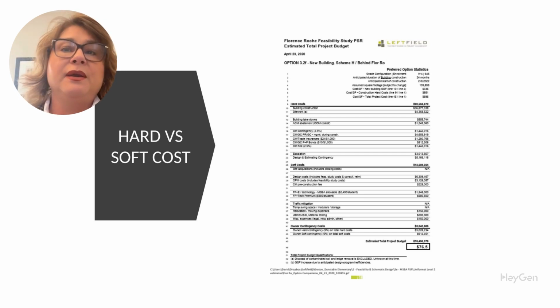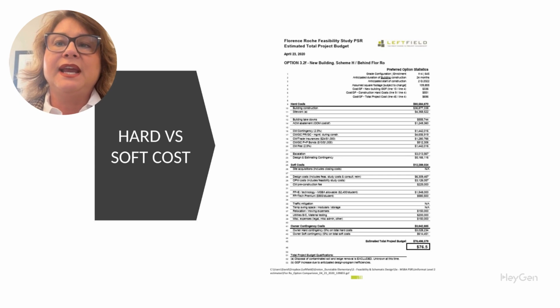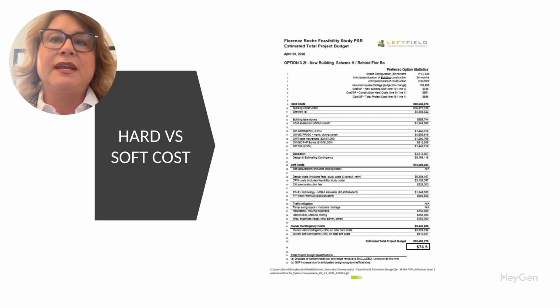So what's the takeaway here? Total project budgets go far beyond what the contractor builds. Soft costs, fees, insurance, and contingencies can add 30-40% to the base construction value. As estimators, it's your job to understand and explain all of these components, especially in the early phases when budget risk is high. Also note that certain things like soil disposal are excluded at this time due to unknowns. You'll often see these gaps in feasibility budgets.